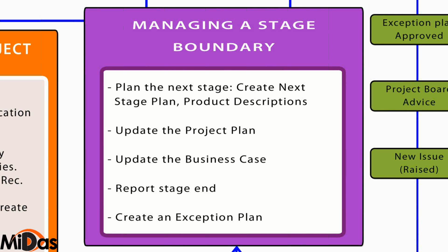Now, the stage wherein the project manager has prepared all these strategies and everything, he would now prepare the next stage plan: what is it that we are going to do now. Along with the stage plan, that is, what we'll do in the next stage, what products we'll deliver in the next stage, how I will report to you within the next stage, how frequently I will report to you. He will put in all those details and submit to the directing level and seek approval to continue.